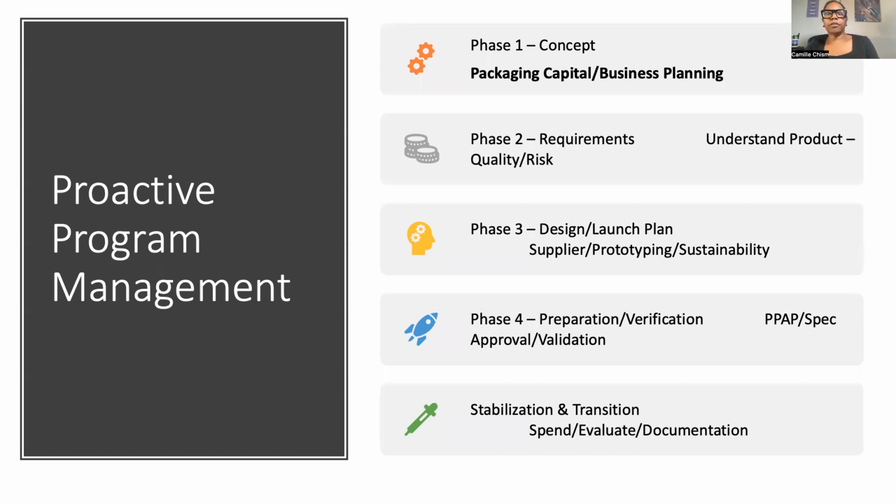So you have to put together a plan, explain exactly what it is that you are looking at doing. And when I say exactly what you're doing, from a standpoint of how many containers you think you're going to need, what the cost to develop those containers will be, like we spoke of yesterday, and then put that together in a budget. Like I said, many times the program team in finance will make up their own estimate.